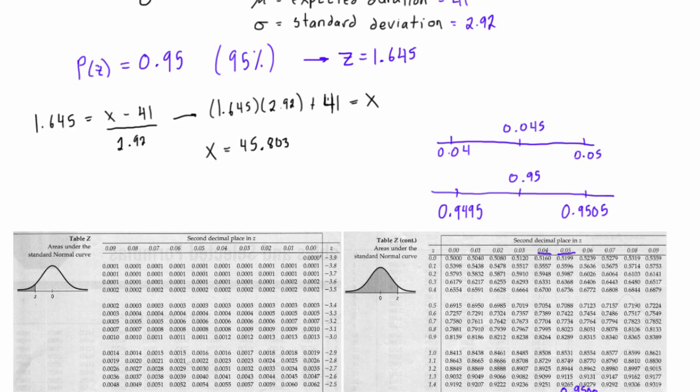Let's look down here. We're saying that if we center our mean here, our mean was 41 and we're finding this x value here to be 45.803. So that's μ and that's x. This is saying we have a 95% probability that this project will finish before 45.803 days—so anywhere in this shaded region we have 95% chance of that happening.